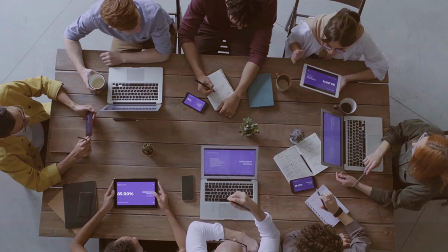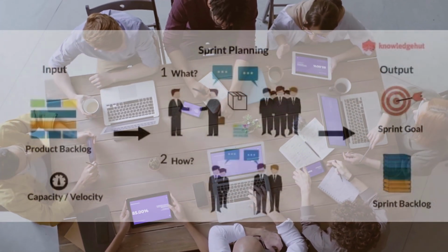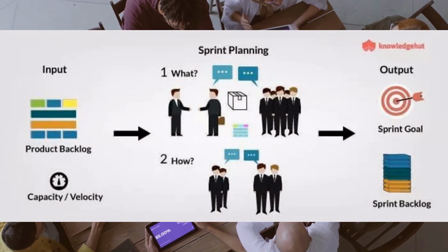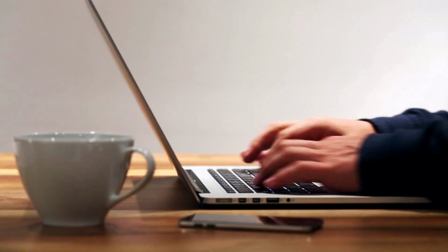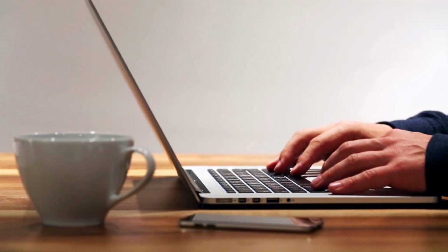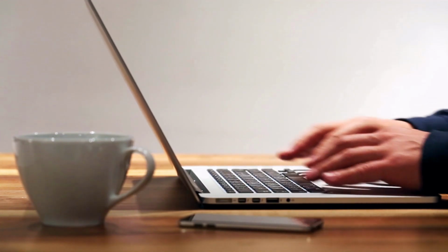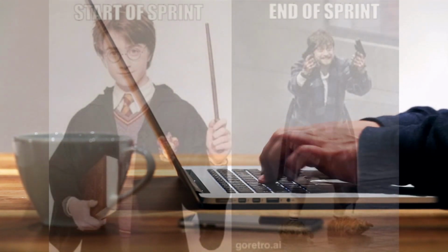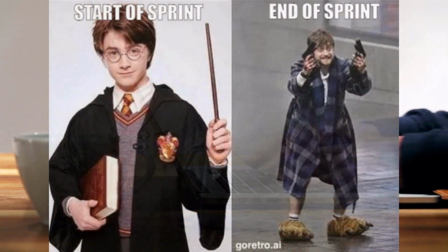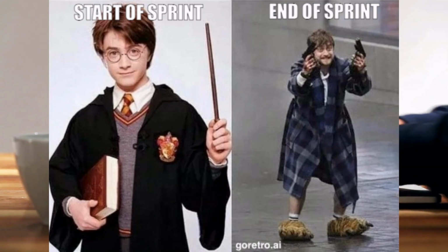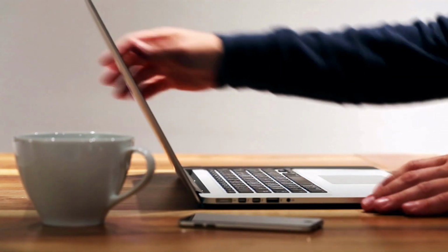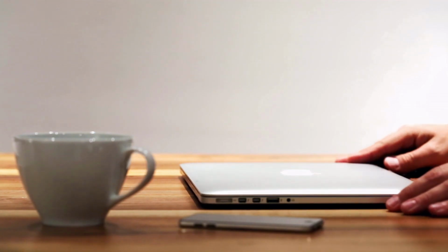There is also sprint planning. This is a team meeting at which it is decided what tasks will be in the sprint, and goals are set for implementation in this sprint. What is a sprint? This is another important concept in Scrum. A sprint is a period of time during which developers perform some fixed set of tasks estimated at planning poker in an evaluation session. And at the end of the sprint, there should always be a workable piece of the product, or the entire product, that can be demonstrated to the customer. The important thing is that by the end of the sprint, there should be a workable piece of functionality.